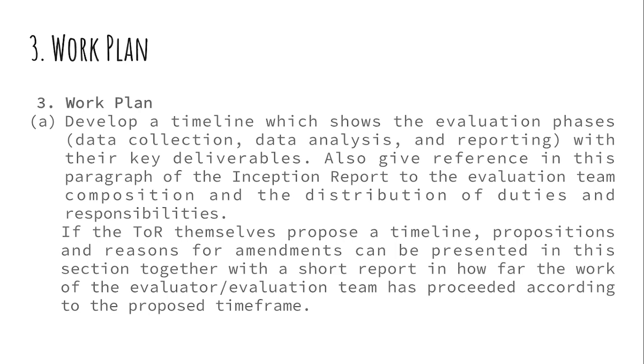So here you show the evaluation phases, which are data collection, analysis, and reporting with their key deliverables. And also you give references in this paragraph for the Inception Report to the evaluation team composition and distribution of duties and responsibilities. You're going to look at the template. So you give the evaluation phases, and also you indicate who will be responsible and the time they will be able to do that responsibility.